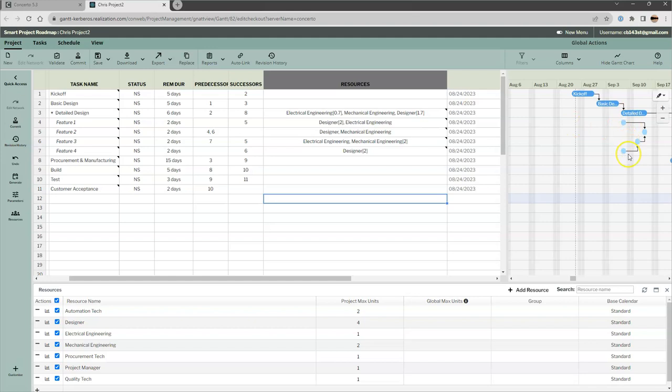These first two tasks, I need two designers here. I need a designer and two designers up here, right? So these tasks, although they may say start together, we don't have enough capacity to start both of them, but there's enough capacity within the stream, right? This can move forward, it's not going to interfere with these. So I need 1.7 designers over the length of this tier 1 tasks, and then as long as I'm facilitating the execution of these tier 2s, I'll be in good shape.